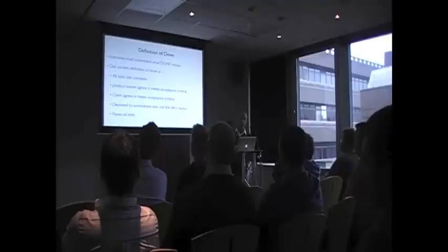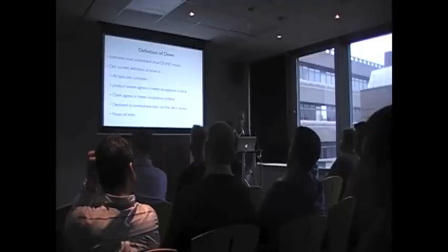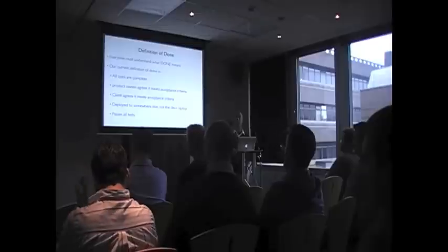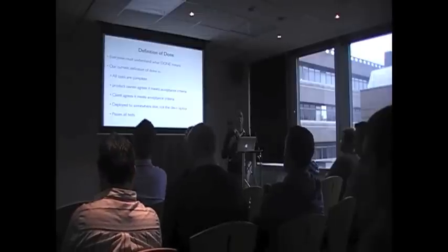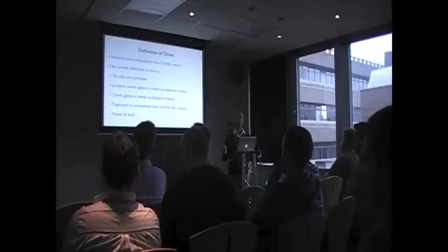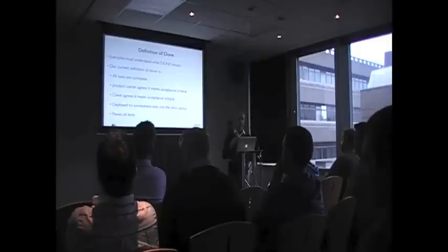The definition of done, as I mentioned before, is quite important. Everyone must understand what done means. Done doesn't mean, oh, it's finished, but I've still got to deploy it. That's not done. So you need to define what this definition of done is.